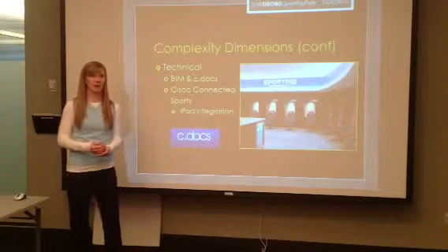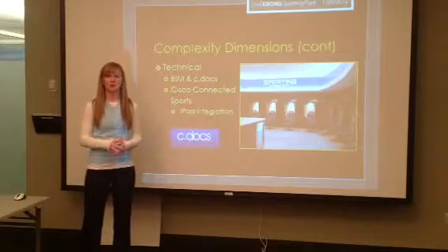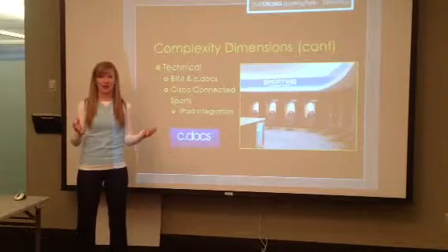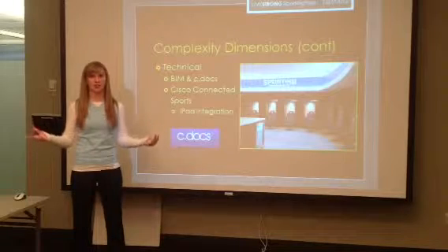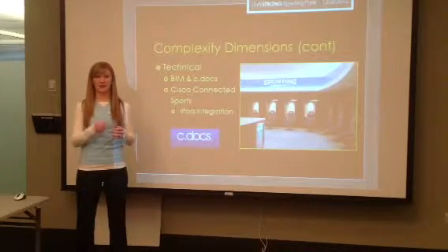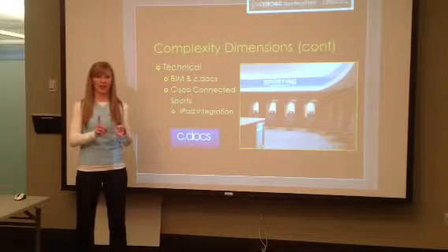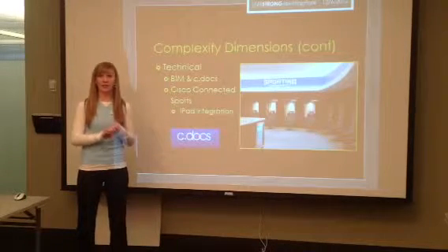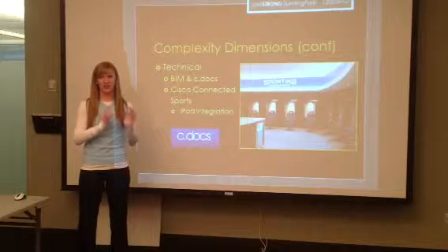We also have a program we call CDOCS, which is basically a website where anyone on the job site, subcontractor, or owner can go to see the drawing, and it's updated with the RFI or a JSI or an ASI, whatever it may be, and that is included on that drawing when they look at it.